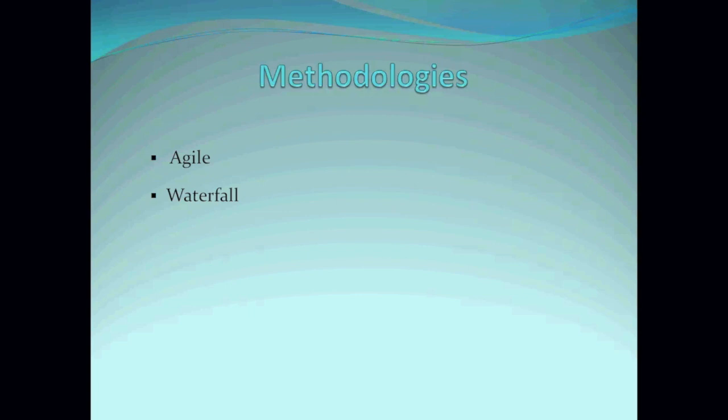Now using agile, they may say, we want to design a website, but we're working on the landing page. So the BA goes and documents the requirements based on the landing page only. It could be 3 days to gather your requirements, or putting things and the documentation together, maybe 2 weeks max. Let's say 2 weeks. Now, by the 3rd week, you're giving all those documents, your user stories and acceptance criteria for that landing page, to your developer.